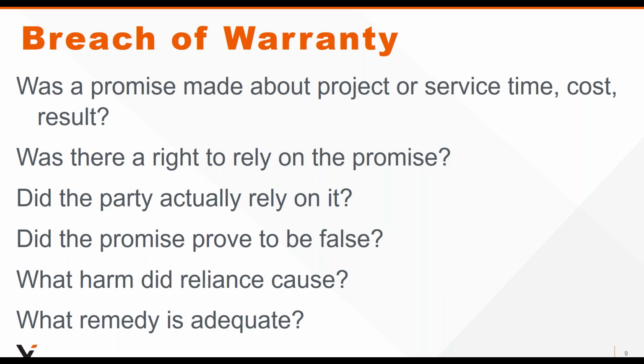And then finally, in terms of legal concepts, obviously you have to know exactly what a warranty obligation is. If indeed you make a promise about a project or service time, cost or result, and the other party had a right to rely on it, and they actually relied on it, and it proved to be false, then you may face a breach of warranty claim because you made an express promise that something would happen based on your activities. The other party relies on it, and it didn't happen. Then you have a breach of warranty claim.